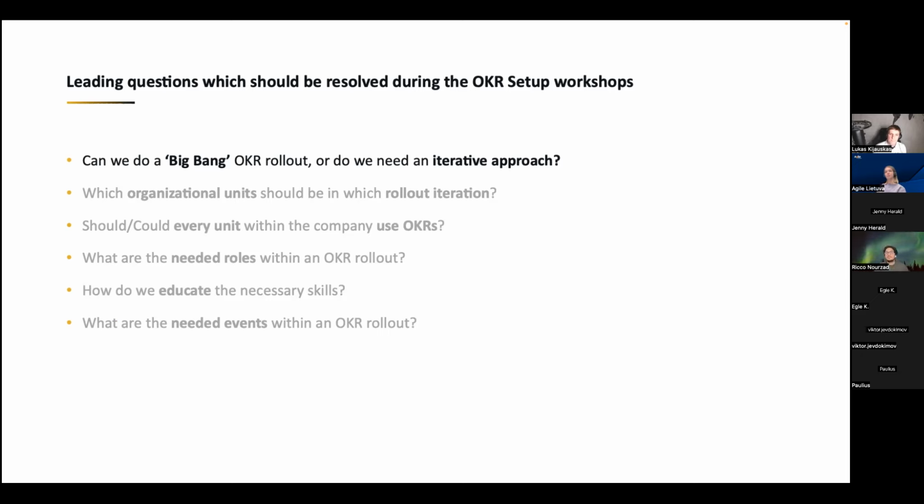So can we do a big bang OKR rollout, or do we need an iterative approach? I told you about the customer I had with 20,000 people. There we didn't have a big bang rollout. Also, if you have like 1,000 people, you don't have a big bang rollout. My rule of thumb is, if you have more than 120 people where you want to roll out OKRs, you should do it in an iterative approach. If you have less than that, you can do a big bang approach.